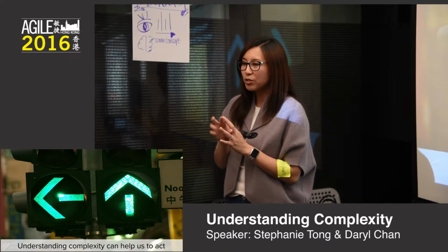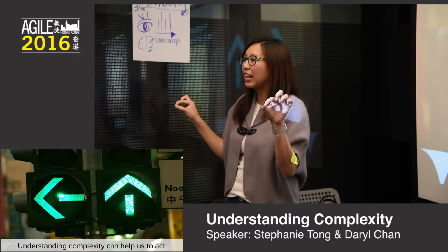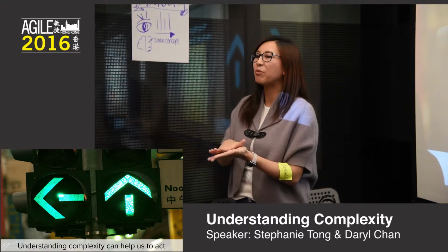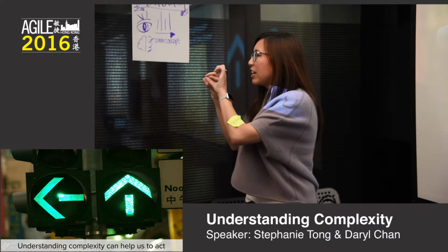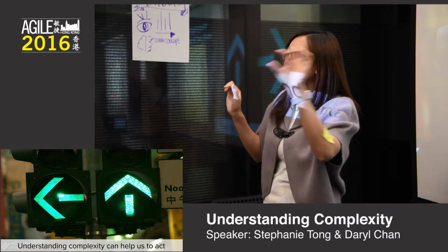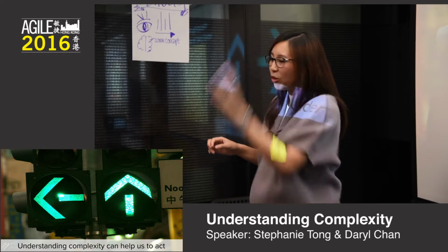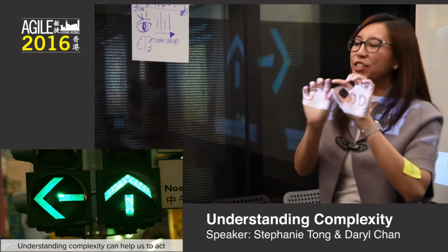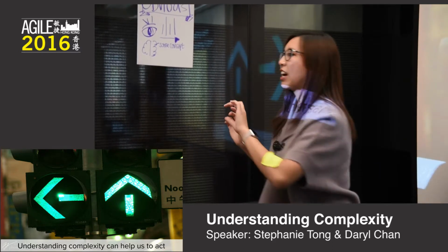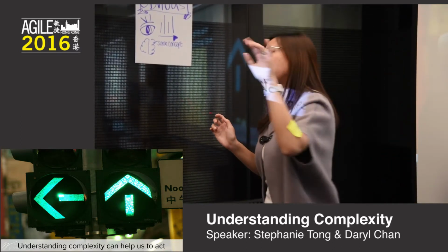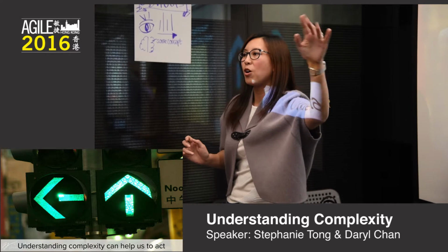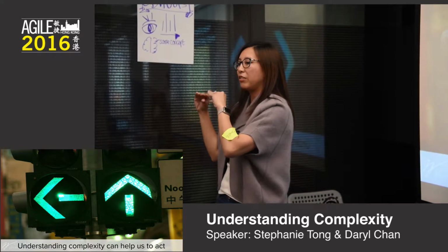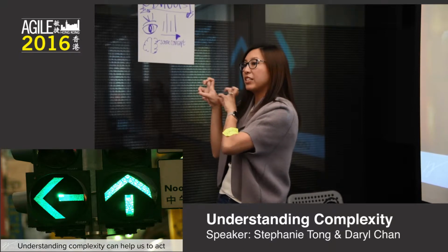So what we have chosen is, we only chose a thin layer to prove that integration, yeah, we got it. So we prove a little thin layer. We're not integrating the whole thing yet. Not all the APIs are built. We only choose a little thin layer, just simply integrating a contact from their system, eventually through all these intermediary systems in between, it will arrive at our CRM system.